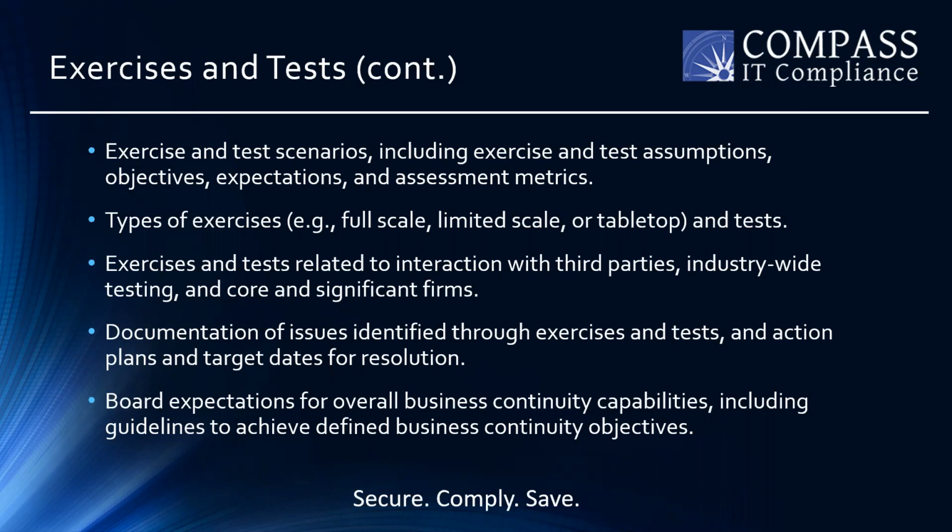So make sure that as you test these plans, you identify issues through your lessons learned, then mitigate them. Make sure that they're put into a project plan with a clear owner and a timeline, and get those things resolved. And then as we talked about, in the discipline of business continuity management, make sure that those results are fed to the board or the oversight of the executive group, whatever oversight is being provided. That way they know a test was done. Yeah, there were some issues. They were mitigated. Here's the project plan for them. So next test, we expect not to see them.